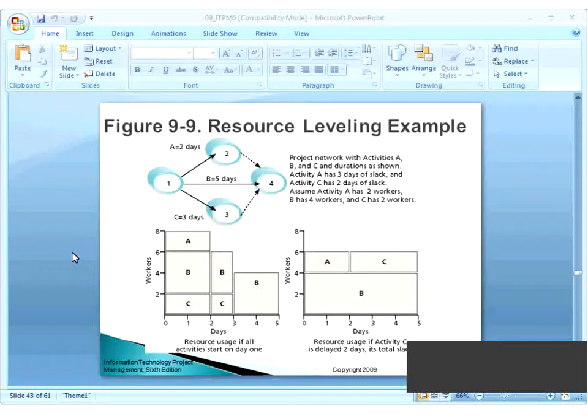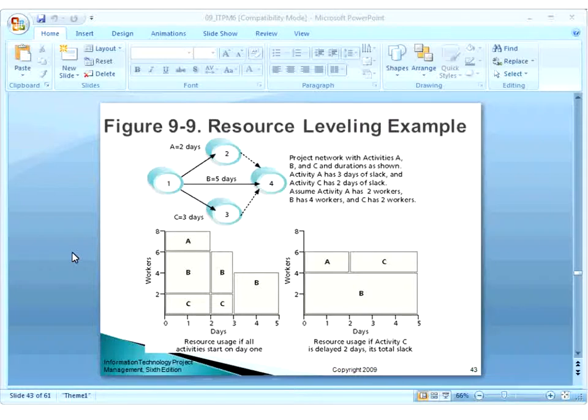It depends on your network diagram. That's why you calculate slack. It helps you find out how much you can delay each activity. So from this slack network diagram, we came to know that we can delay activity C for 3 days, and activity A is going to be over after 2 days. So we knew that activity A's 2 days plus 3 days of activity C will make it 5. After 5 days, both of them will get finished. So you engaged 2 workers to do both of these activities.